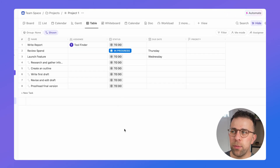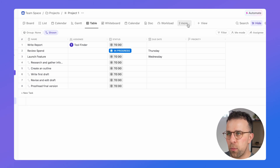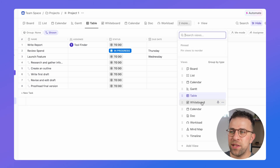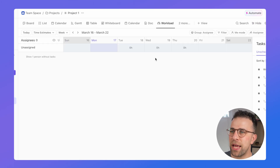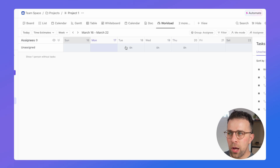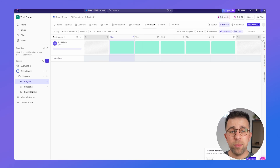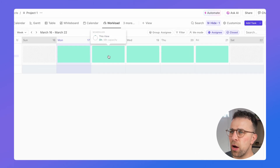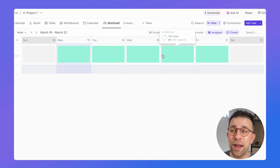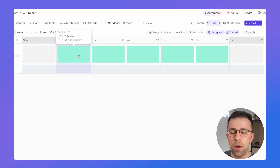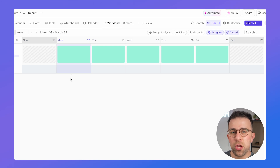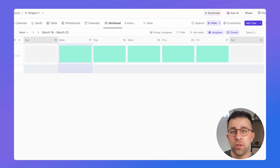There's also a Table view, and then a whole host of additional views. The Workload view is particularly helpful for seeing who's assigned work and how long they're spending on it. You can choose a person on your team and see all of their capacity per day. As a manager, you can see once time estimates are added to tasks whether a team member is overloaded, then reallocate tasks to other people to be more effective.